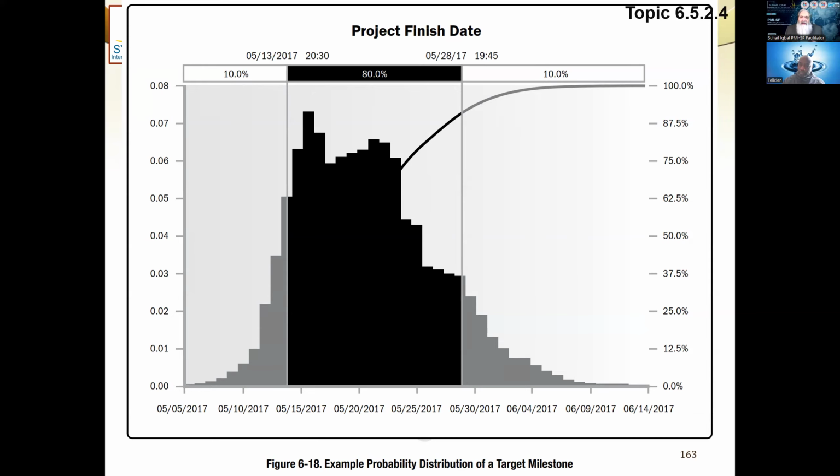If you go according to your plan, you carry 90% risk of not being able to complete it on time. But if you choose 30th of May, you add 15 days to your schedule, and your chances of achieving that target are increased by 5%. Although you are not at 100%, you are ready to take the 5% risk. That is why 30th May could be a good bet.